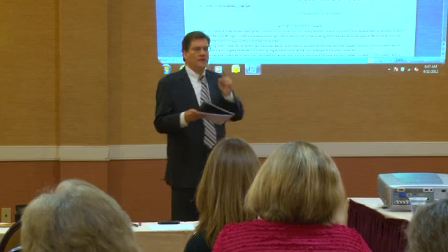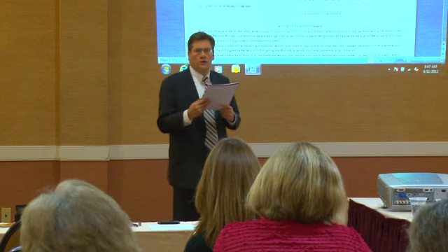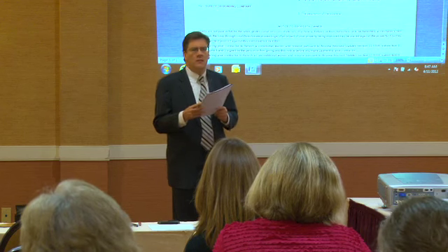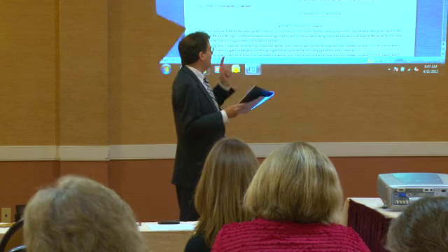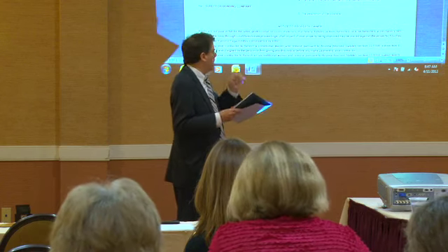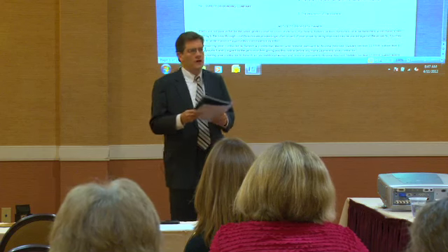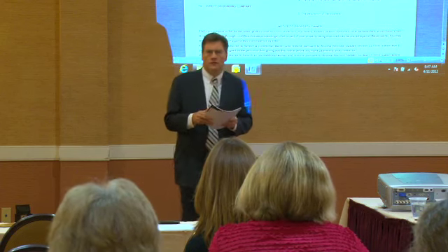If you supplied $65,000 to the project, and your preliminary notice was for only $50,000, you would not be able to record a lien claim for that $65,000. You would have had to supply a second preliminary notice with a higher dollar value in order to capture that additional $5,000. Now, another practical tip here on preliminary notices.